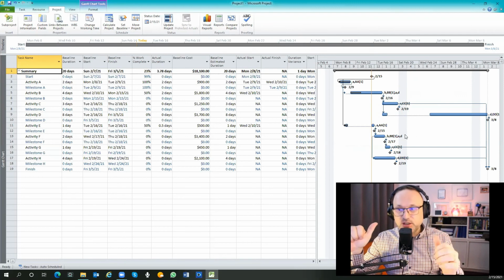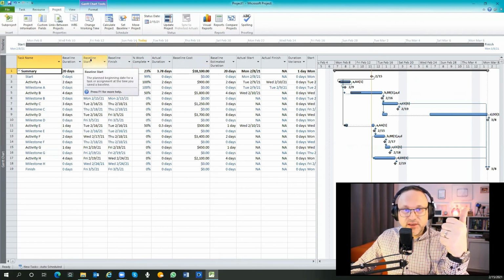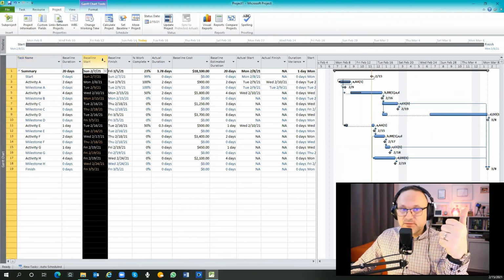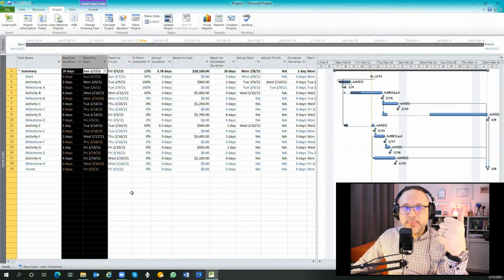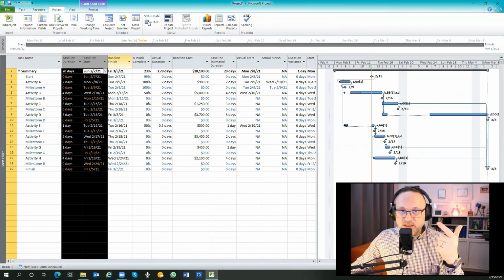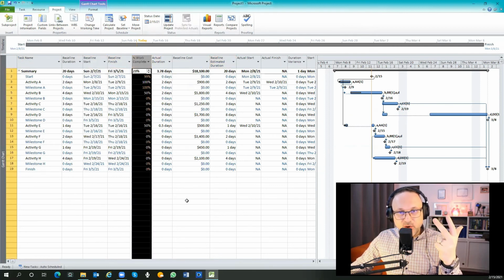So the 6 parts need to be taken care of during your project schedule control. You need to set the baseline. We said how to set the baseline: you put here the start baseline, finish baseline, and duration baseline. Then you need to set the current date over here. Then you need to put the actual percentage of each activity, and set the actual start and actual finish.